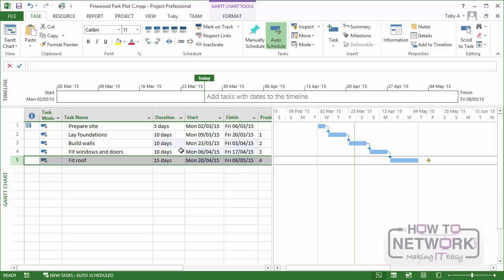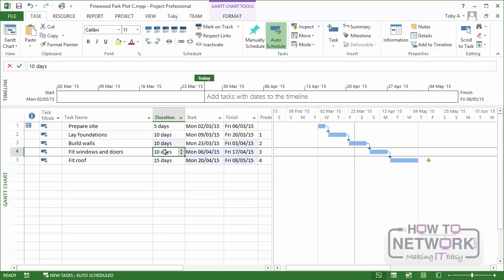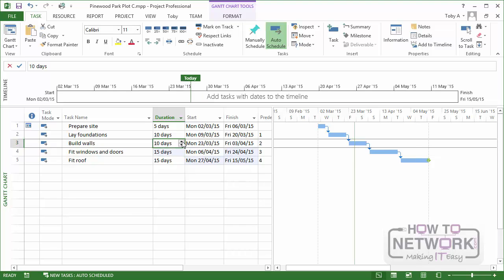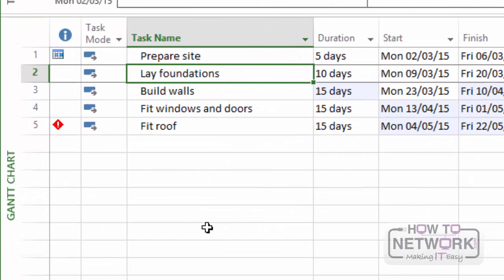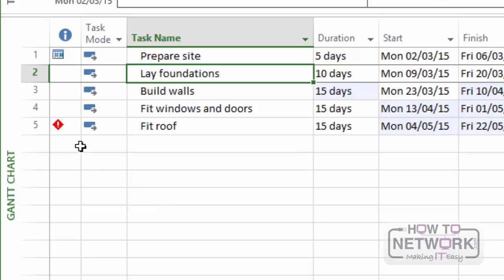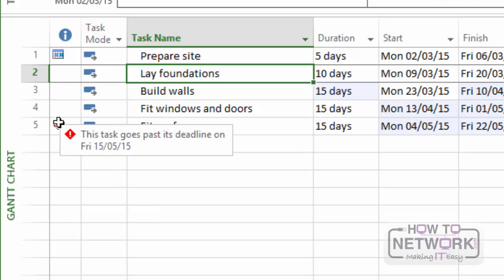On the other hand, if, say, Fit Windows and Doors took 5 days longer and Build Walls took its original estimate of 15 days, you can't actually see the deadline marker now, but if you look over in the information column on the left, you'll see a red warning diamond. Now, as I say, you don't get a message from the planning wizard or something else saying you've got to change something because the schedule works, but you do get visible warnings such as this one. Let me just hover over it. This task goes past its deadline on Friday, May 15th.